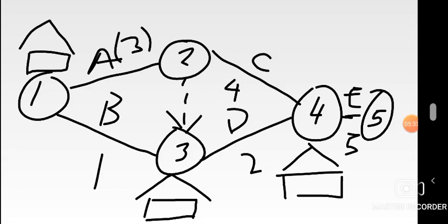So let's start from the first node and then we'll move just like that. At node 1, most of the time what you should know is that this is just from the first beginning there. Nothing has happened yet. The network hasn't yet started moving. So usually the earliest start time at node 1 is 0. Just remember that rule. You have to squeeze in a small 0 in the rectangular box on node 1. Let's just deal with the rectangular boxes first.